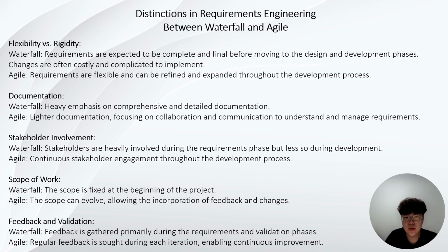In this section, I will introduce the distinction in requirements engineering between waterfall and agile. We can compare them from these aspects. The first, flexibility versus rigidity. Waterfall requirements are expected to be completed and final before moving to the design and development phases. Changes are often costly and complicated to implement. Agile requirements are flexible and can be refined and expanded throughout the development process.